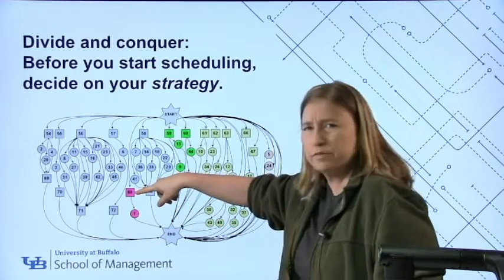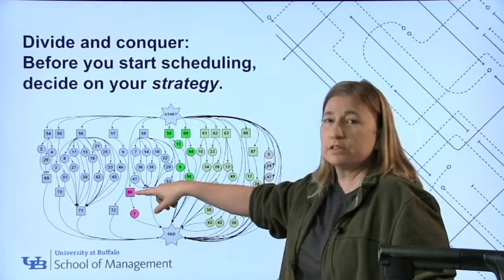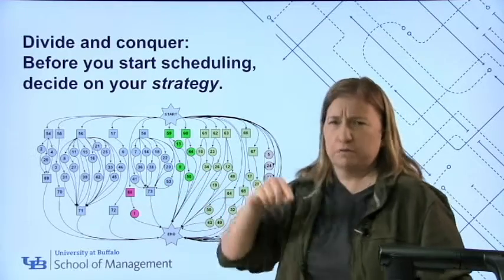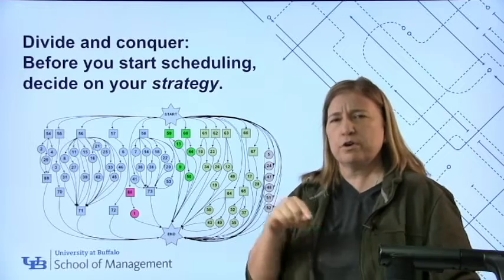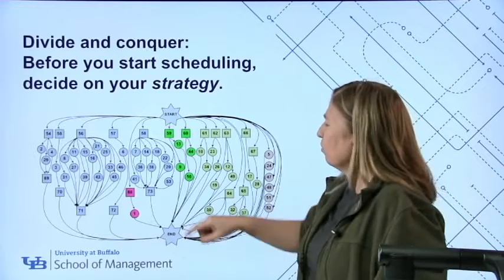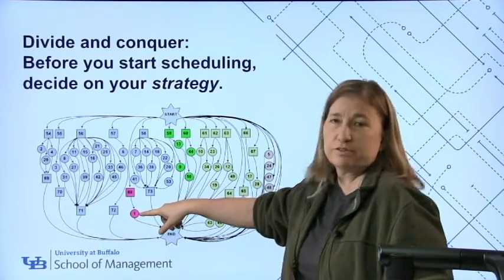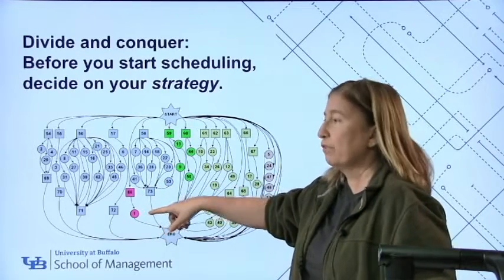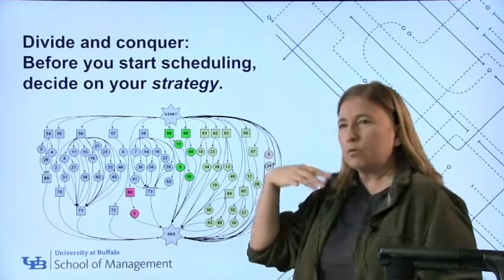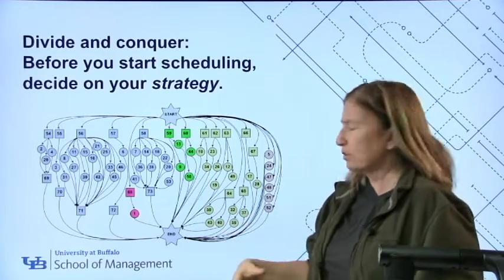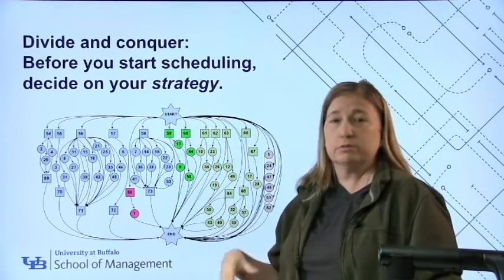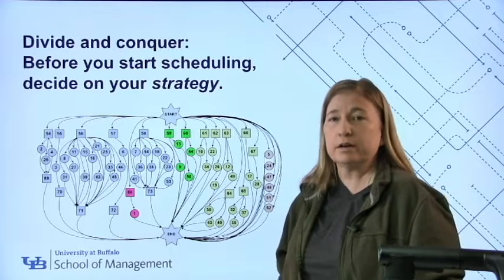That means that I'd have to do, squares were technical tasks, this task first. It has to be finished first. Number 68. Oh, right. This is location 5 in here. That's prepping location 5, and that's filming the only scene that's on location 5. Anyway, if you were somebody like Robert Altman, a favorite director that liked to do this, that would be your strategy. That's how you'd begin.